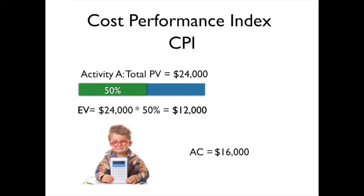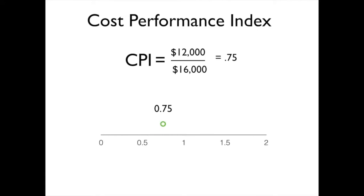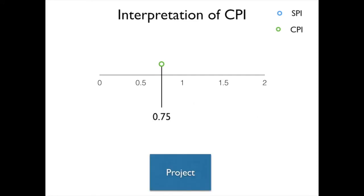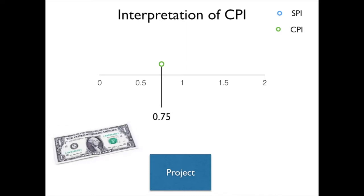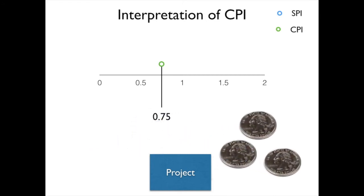To calculate the CPI, we're going to take the earned value and divide it by the actual costs. In this case, we're going to get a CPI of 0.75. When we look at where that sits on our scale, we see that 0.75 indicates that we are over cost or over budget. Another way to look at this is: for every dollar that we put into our project, we are only getting $0.75 back out of it.